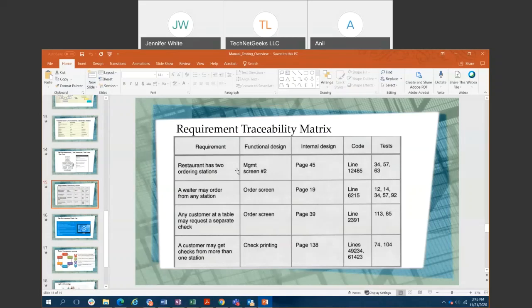And right now you have online restaurants, so you have requirements based on that. This requirement traceability matrix becomes the key anytime the customer or the lead asks you, what are you testing? You say, I'm testing this. And they ask, how does it match with the requirements? You can trace it all the way back to what the requirements are. And you'll learn how to do that.